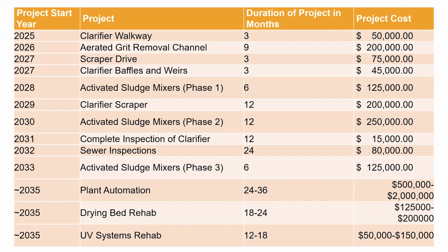For our example, we use previous projects that we have worked on to estimate the duration for each project and what they might cost. For developing a simple CIP with just estimated costs, this can be a useful strategy to give you and your stakeholders a ballpark idea of what to expect if specific plans are not available.